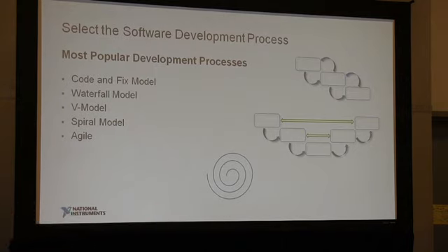How many of you are familiar with Agile? Yeah, Agile is becoming very popular. There are a lot of tools out there that will support Agile software development. We define our tasks, and then we have a weekly or bi-weekly sprint, and we assign what tasks we're going to get done during that sprint. So you want to have the tasks small enough that you can get them done in one sprint.